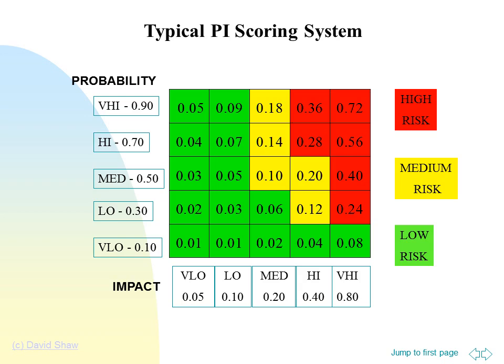If we use the recent rainstorm as an example, we can plot various results to help us understand the scope of the risk. I think we can agree the impact of the storm was high or very high. It certainly was not a medium event. I think we can also agree that the probability is higher than low. So here's a plot of high impact and a range of probability from very high to medium. Here is a plot of very high impact and a range of probability from very high to medium. In both cases, you can clearly see that we need to take action to mitigate the risk.